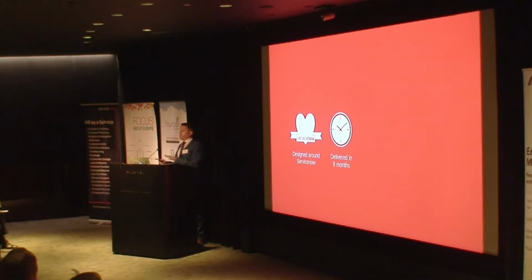We introduced ServiceNow within less than 12 weeks, from my first discussion with the ServiceNow team to us having it implemented. We used an agile set of development processes to enable us to do that. And we worked very closely with the business to make sure that the service we designed was designed in a way that they would want. And we used the opportunity of us doing this to reframe and have a chance to have a new conversation with the business. And the results were amazing. We managed to reduce Gatwick's IT OPEX on a yearly basis by more than 12%.